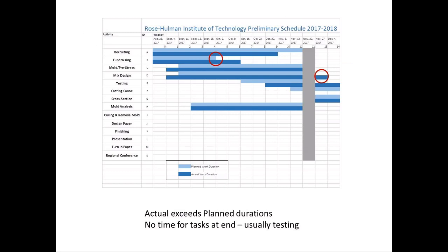Projects start to go off track when actual task durations are longer than planned durations in the earlier middle part of the project. The year starts on a positive note, but students get busy as the year progresses and just don't put in as many hours on the project. There's often enough slack or extra resources available to get back on track in the middle and later parts of the project, so as final deadlines approach, extra hours are put in, corners are cut, and tasks are skipped.